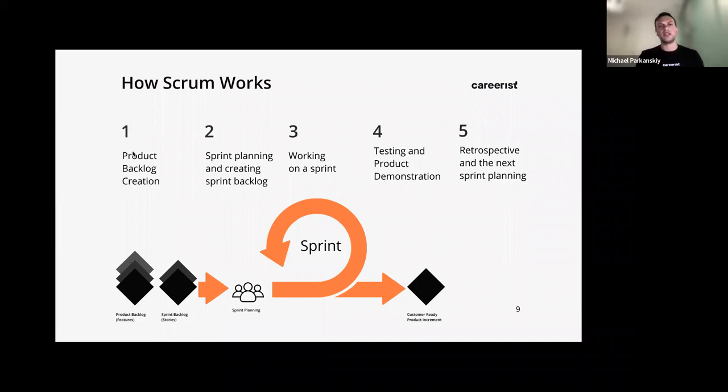You might have a bug sitting in the backlog that's not extremely important. It may be like there's a button that's the wrong color, but right now you have other things to get to because your customer wants a certain feature, and you're going to keep that in the backlog because you don't have enough engineers to get to it, or it's not in your scope of work.